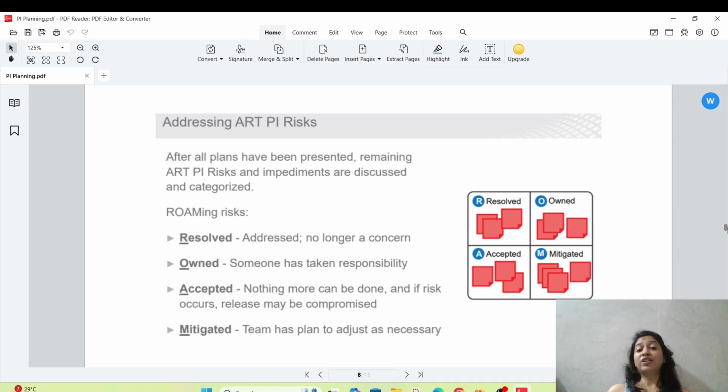We have discussed ROAM, as I said in the last video; we will of course discuss everything in this channel. So what is ROAM? Roaming risk, that is ROAM: Resolved, Owned, Accepted, and Mitigated. Resolved means addressed, no longer counts. Owned means someone has taken the responsibility, because the risk is there. Then Accepted: nothing more can be done. We have to accept this risk.